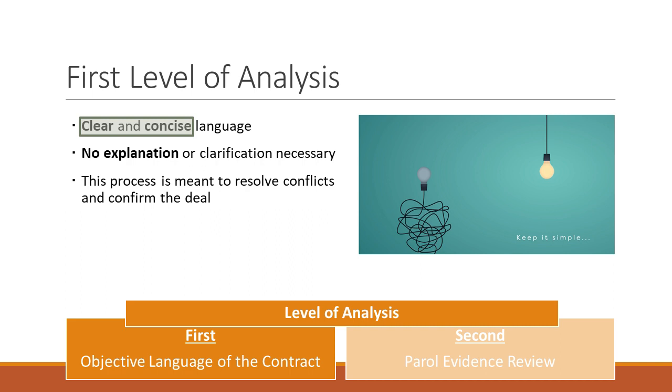So that's a great question. And in fact, it happens at all different levels in the construction world, at all different times. For those of you who have worked a little bit, there's this thing that you'll be very familiar with the rest of your career called an RFI. It's a request for information. So you have this contract with the owner that you're going to design the drawings. And the drawings are actually part of the contract. The actual contract will say the contract documents, which means it's part of the four corners of the contract, will include our drawings and specifications.